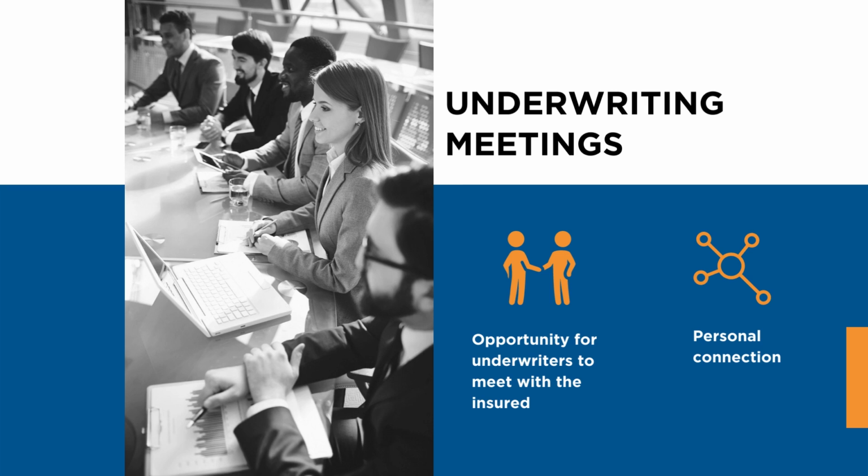This is an opportunity for underwriters to meet with the insured and to make a personal connection. The last thing you want to be is a faceless name on a sheet of paper. You want to take the opportunity to build the relationships, let them ask questions, find out about you, gain a comfort level from you personally. That's only going to help you in getting the best terms and conditions for your wrap-up. The timing of these meetings, they should be getting scheduled 2 to 3 weeks after the submission release and should be completed no less than 60 days prior to binding.